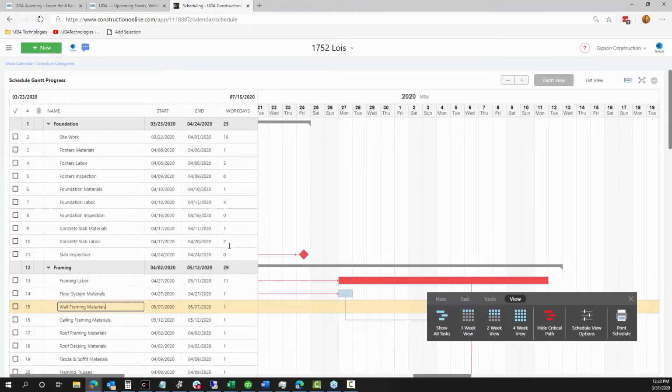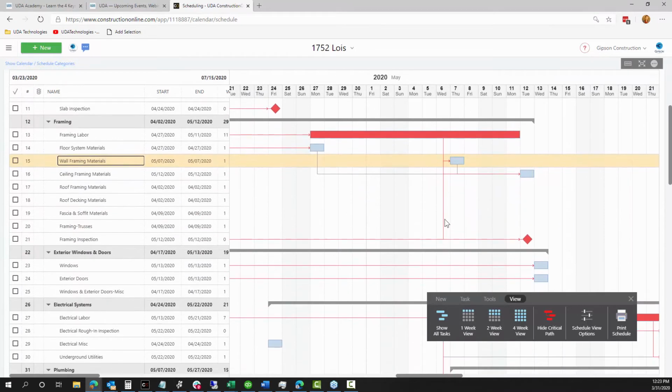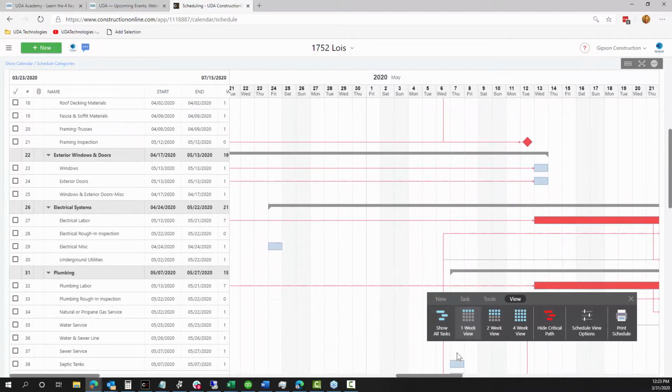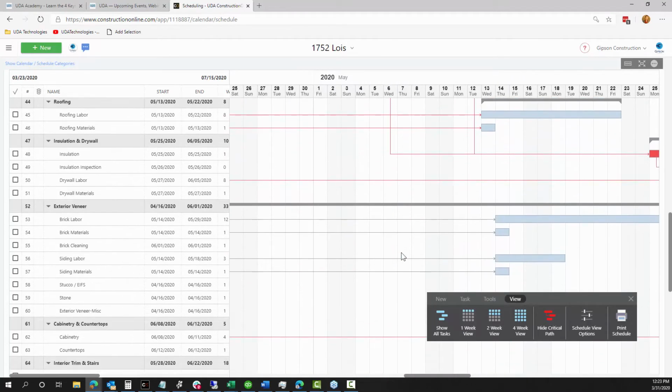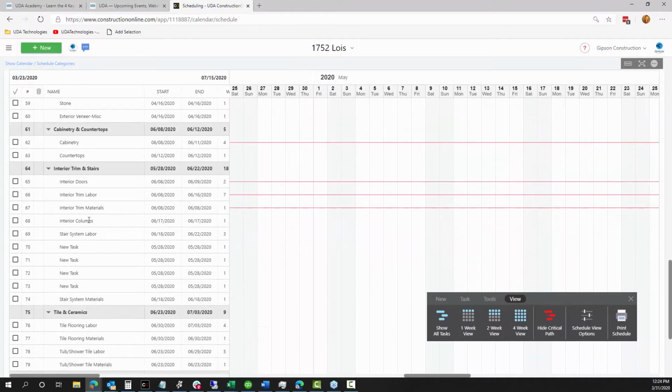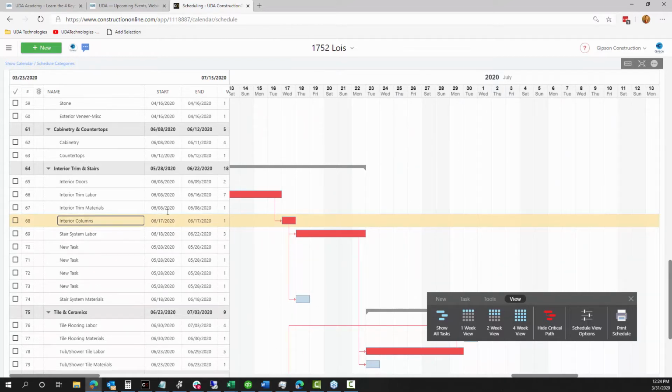Now some have not, so we'll take a look at what the critical path means if we follow these red lines. Really, a critical path is working its way almost backwards from the end of our schedule. So it will highlight in red any task that has a direct impact on the end date of the project or of the schedule. Some things that are typically not connected with predecessors to the end may not really have bearing directly on where we finish, the end date of the schedule. It's important that all things are done on time, but for some items, you have a little bit of wiggle room. If it happens a day or two later, it doesn't really, in the end, impact the last day,